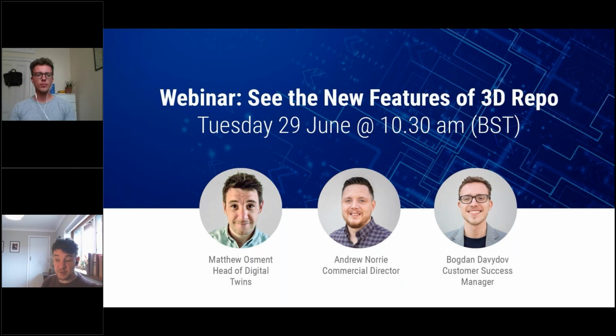The other thing I should have mentioned before is that you can attach multiple sequences to the same model. So you can show different iterations, perhaps if you're looking at different ways that you might construct different programs, you can add them all to the same model.